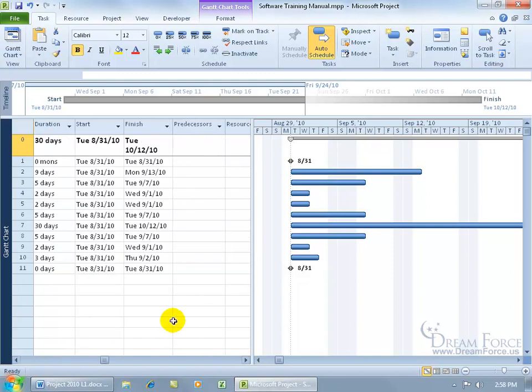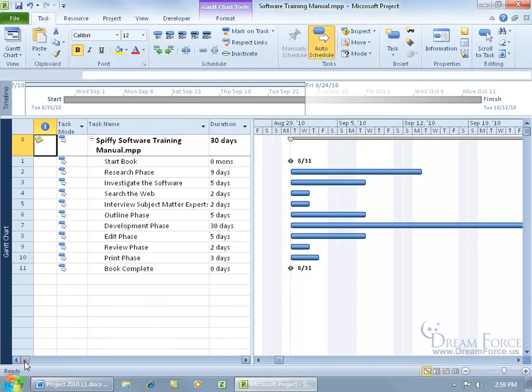The start and the finish as well, but that's automatically calculated based upon when you start and the duration of the task. In any case, let me go ahead and scroll back. So that's the entry table.